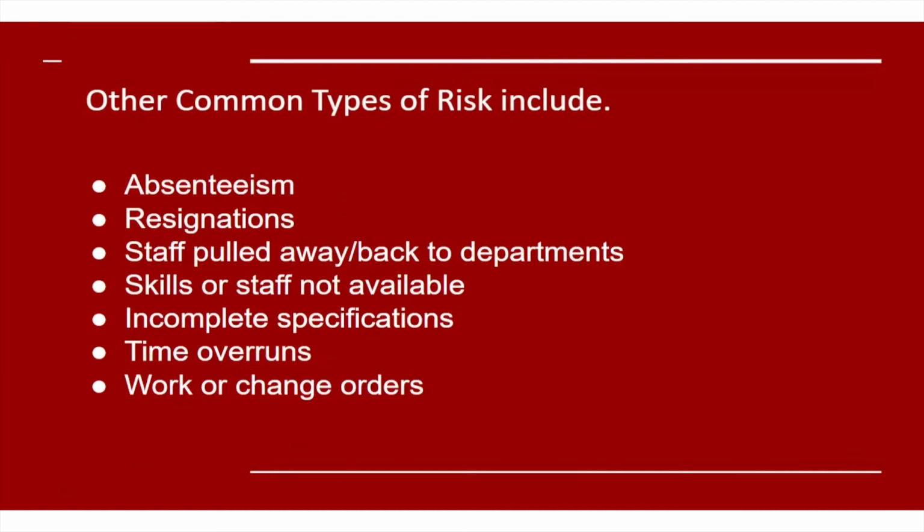Other common types of risks that are more common but less well thought about are absenteeism, people don't show up to work. Resignations, people quit. Staff pulled away back to other departments, so you lose your people. Skills or staff not available, you just don't have that. Incomplete specifications, this happens a lot in manufacturing businesses. Someone sends you a set of specs to make something and it's not complete. You can't do it. That has an impact.